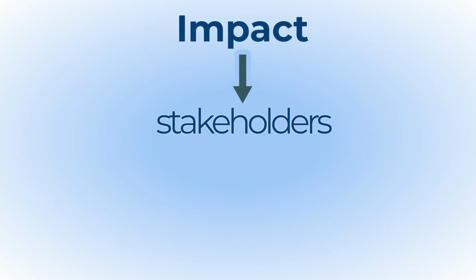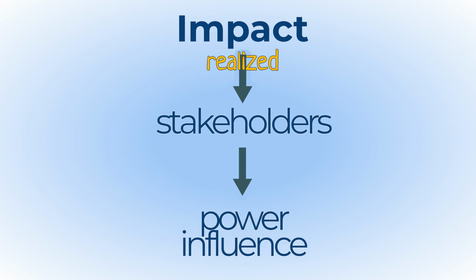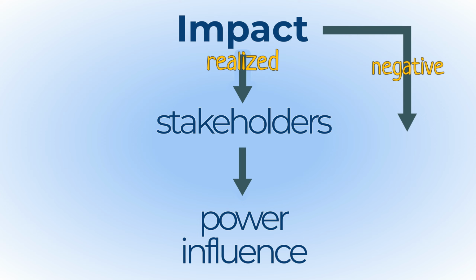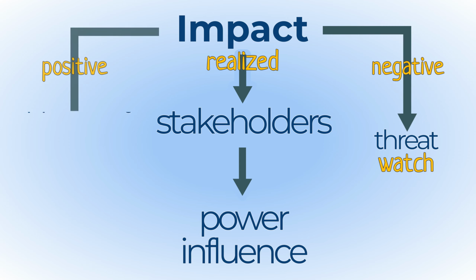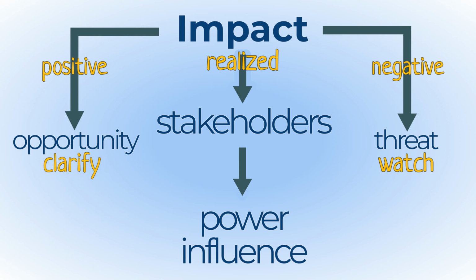The impact of the project outcomes on the stakeholders should be analyzed too. If the stakeholder realizes the impact of the project on him, this will drive him to use his power and influence in what serves him, and this is normal. If he's impacted negatively, like a competitor for example, he will be a great threat to the success of your project. Make sure to watch for those. On the other hand, stakeholders who will be impacted positively are viewed as an opportunity. This impact must be clarified to them, because if they're not aware of that, you're losing a good soldier who can fight for your project.